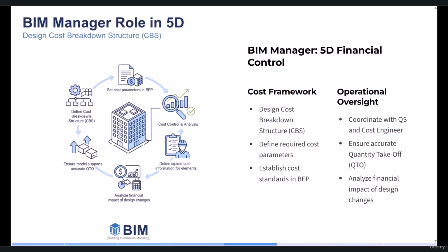The second level will be categories. The costs will be divided into different parts, like structure, architecture, mechanic, and, for example, site. The third one will be items. So we'll go through the details of the items, and they will be divided into them. For example, structure includes foundation, concrete or steel structure.